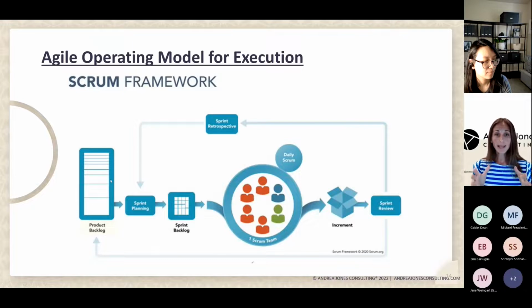Then you do a planning session for whatever it is you're actually going to work on, the top one, or maybe you're doing two, and we'll talk about how many to do simultaneously. Within that, you've got the main components, the product owners help with that, and then this team puts together the sprint backlog of tasks. They're the ones who pull off the top the things they're going to commit to sequentially. And the different colors in that image represent the cross-functional nature of the team. And then that little circle there, they have a daily scrum.